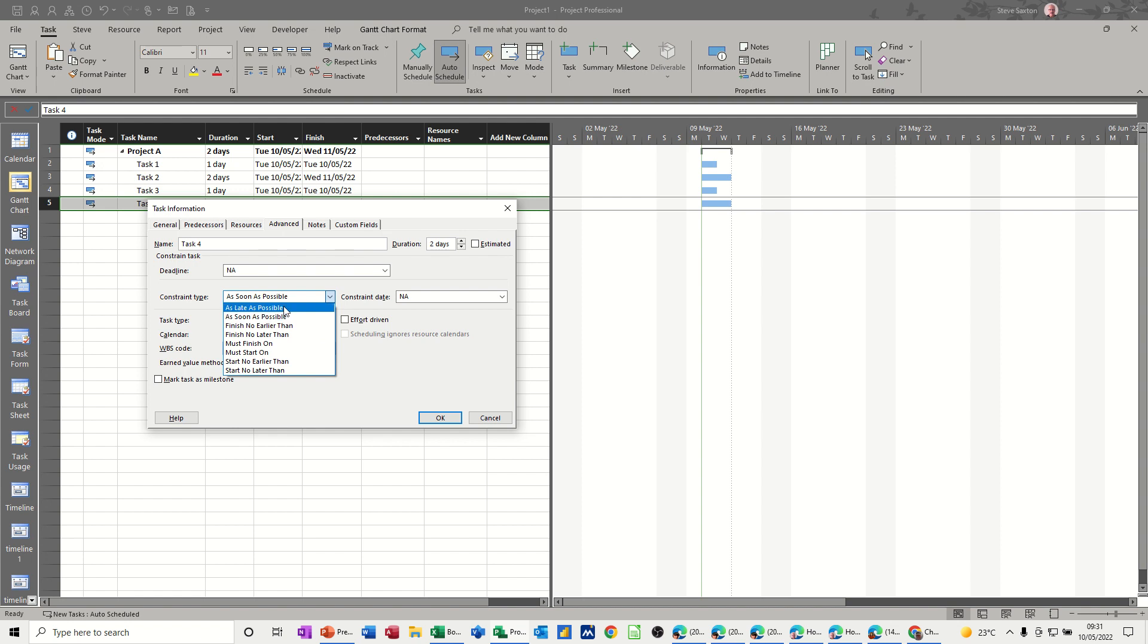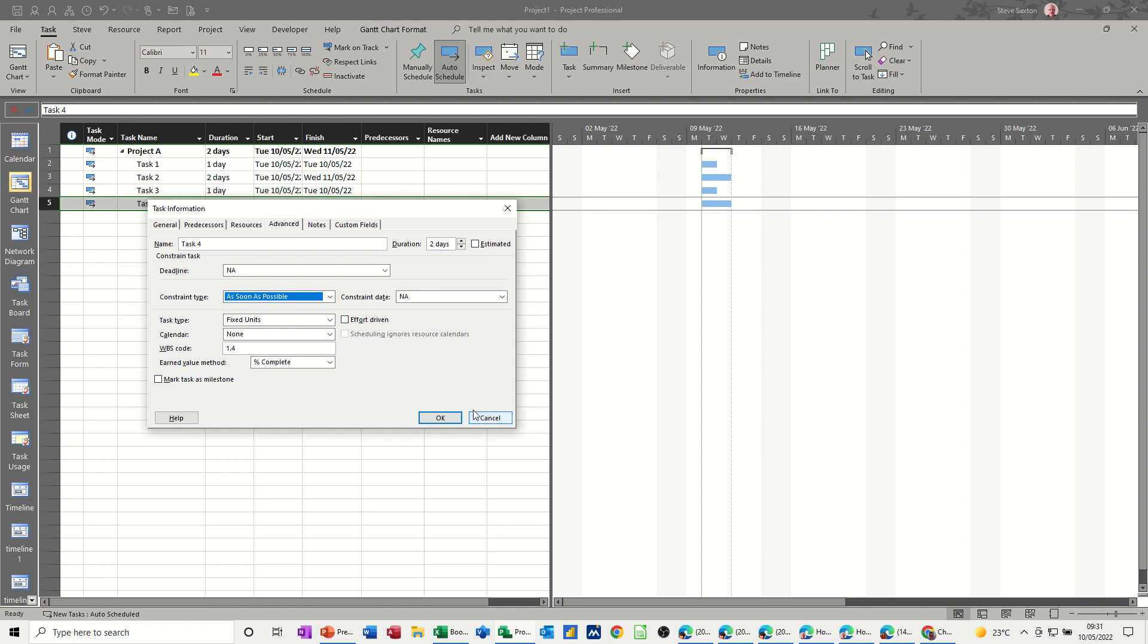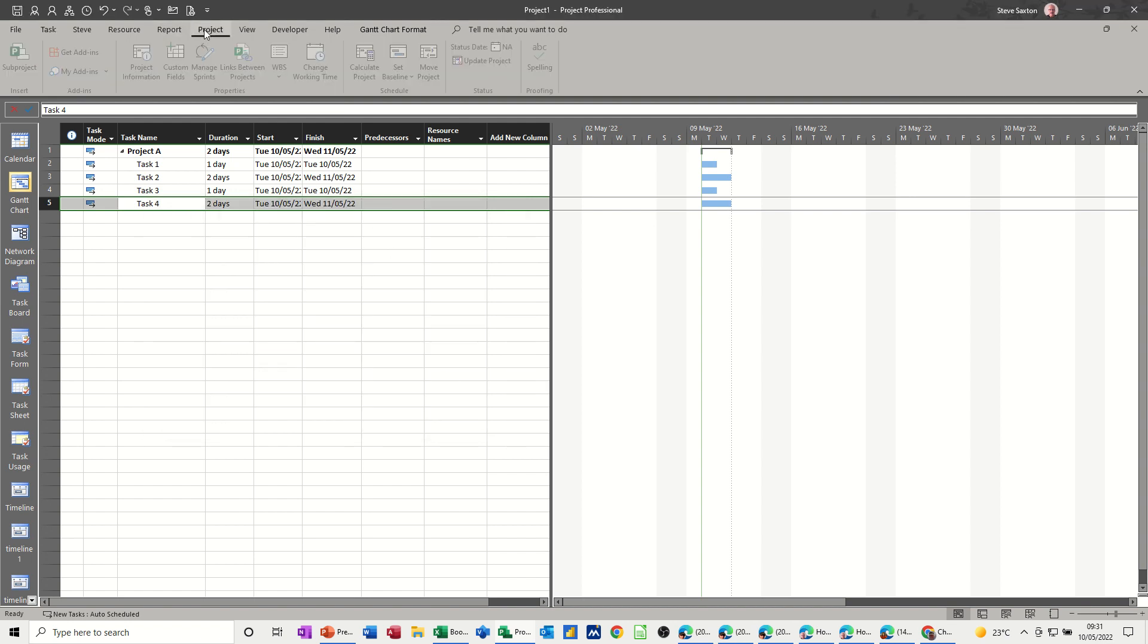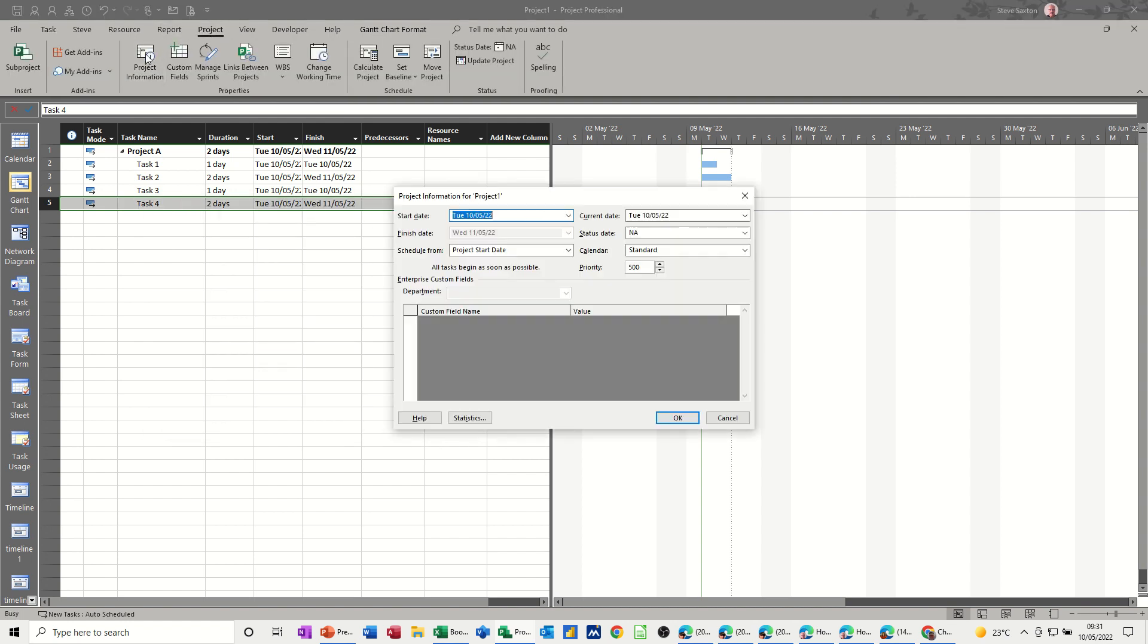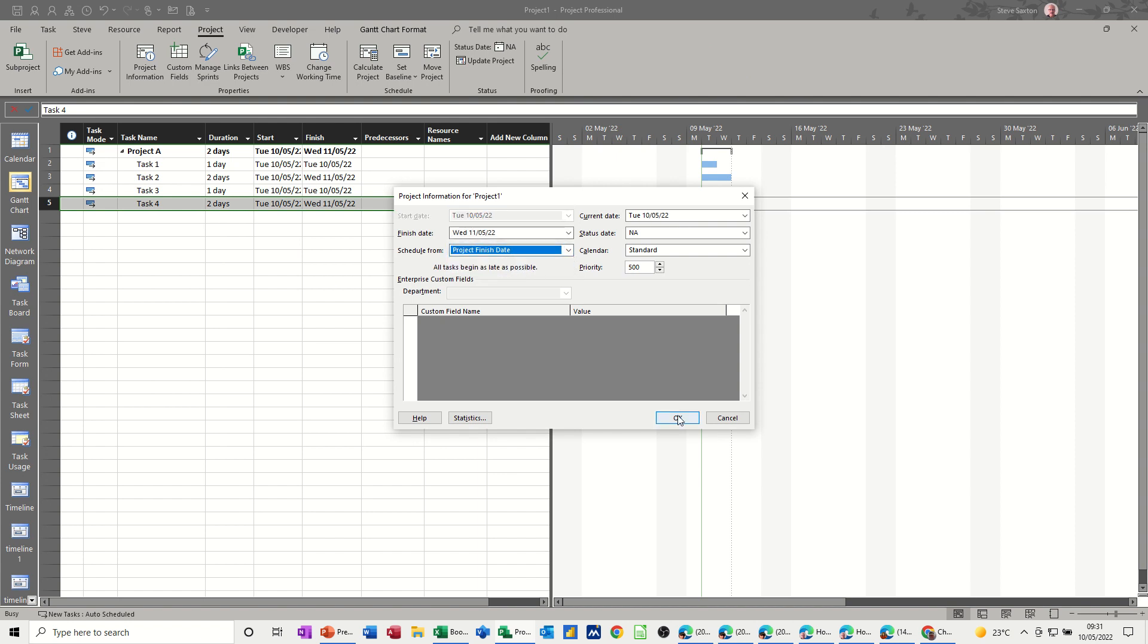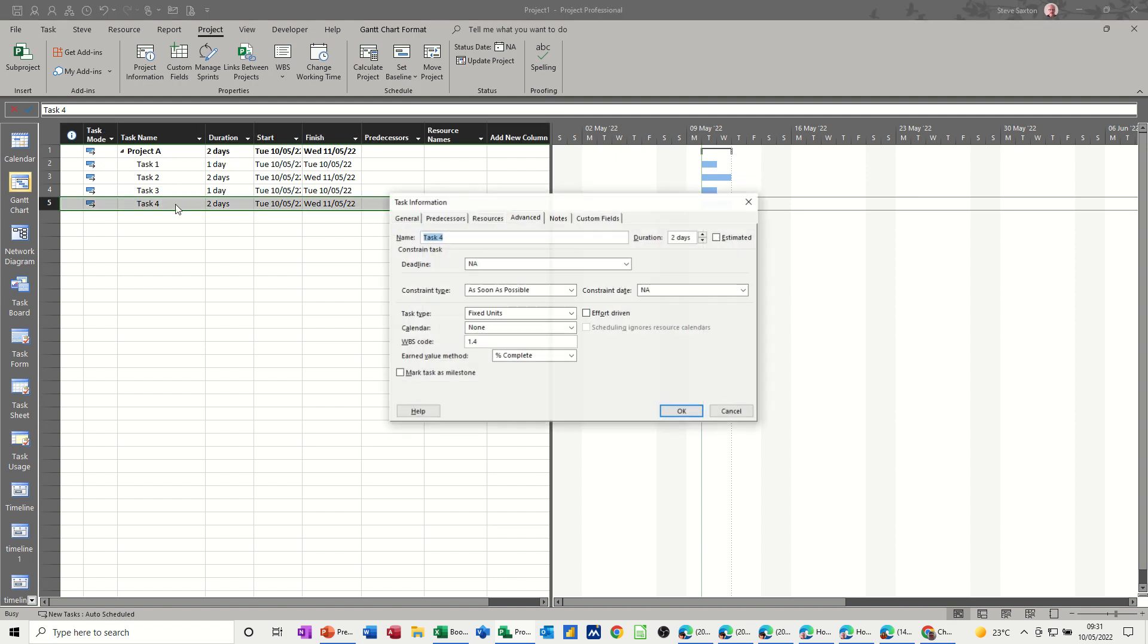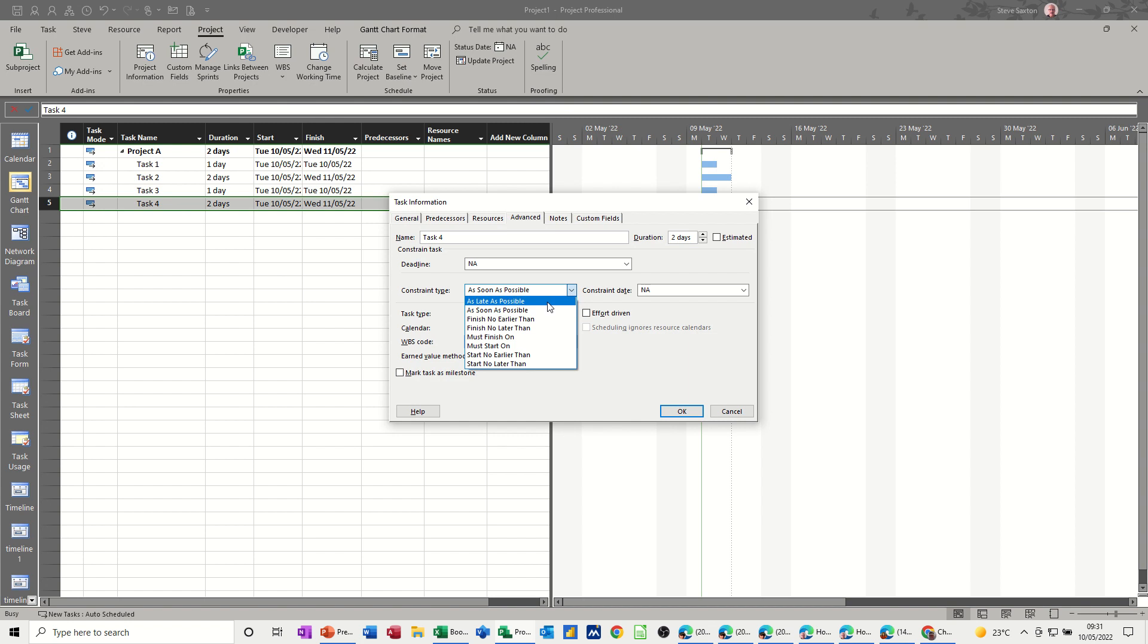If it is going from an end date or a finish date, the default would be as late as possible. So if I just cancel this off for a second, I'm just going to Project Information, that's where you set this. So it's on a start date. If I change that to a finish date, and then click OK, and then just double-click into that, this would be set to as late as possible.